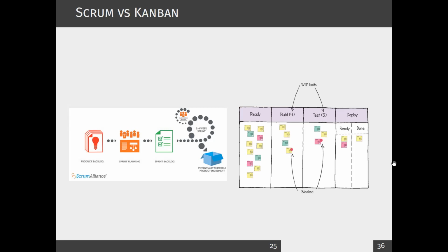Right. Okay. So like velocity in Scrum, in Kanban the focus is on, there are no roles like in the previous case, but there could be 2 roles actually. Later on they talk about service delivery manager and service request manager, but the main focus, like velocity for Kanban, is cycle time. That means how much time a particular task, the work, spent going through the process, right?